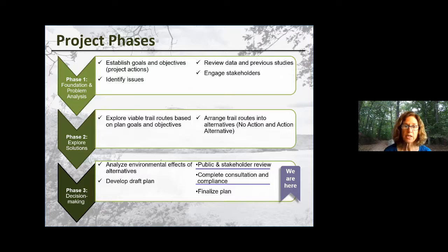And at this point, we are coming out to you to ask you for your review of the plan and any comments you may have. You can put those comments on our website, or you can also speak to us today or type in your comments today. So once we gather the public review comments, and we have approximately a month to do that, we will complete our consultation with agencies such as Fish and Wildlife Service and the State Historic Preservation Office, and then we'll finalize our plan.